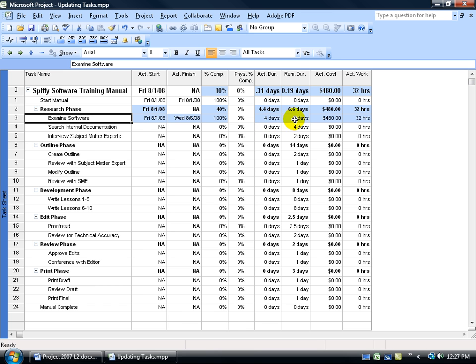So again, if we had five days remaining and we marked it 100%, it would put five days over here, whatever the default plan was. But we changed and we varied from the plan when we went from five days down to four, and so that's what it's actually keeping track of.